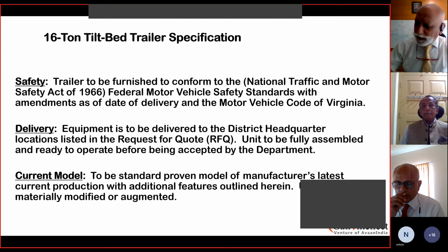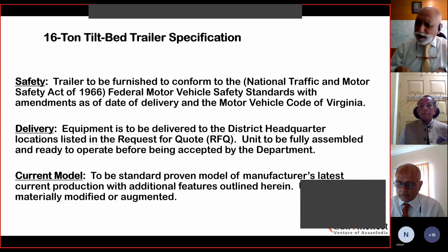It also would mean sometimes removing the overhanging electrical wires. You know, you are moving and your height is more, and you may have an obstruction coming en route because of electrical wires. Or there may be a situation where you are going under a bridge and the bridge height is less than the height of the equipment. You may have to either have a hydraulic trailer or may have to have a diversion to do that. So all that approvals are required before you go for any modification done. It means that.